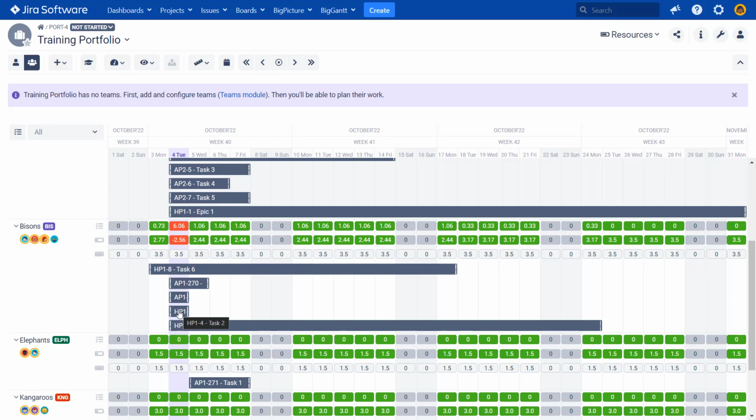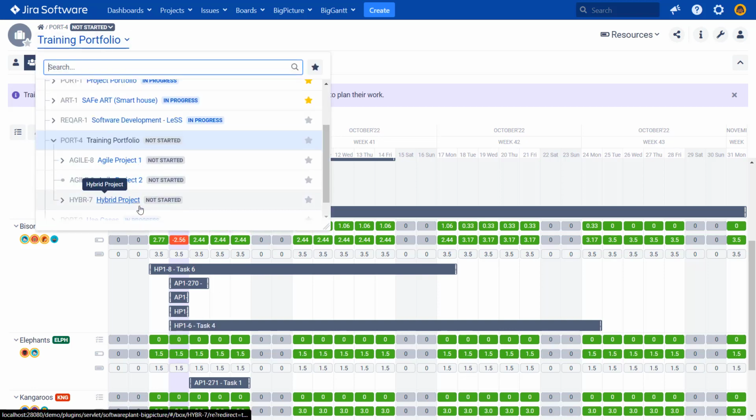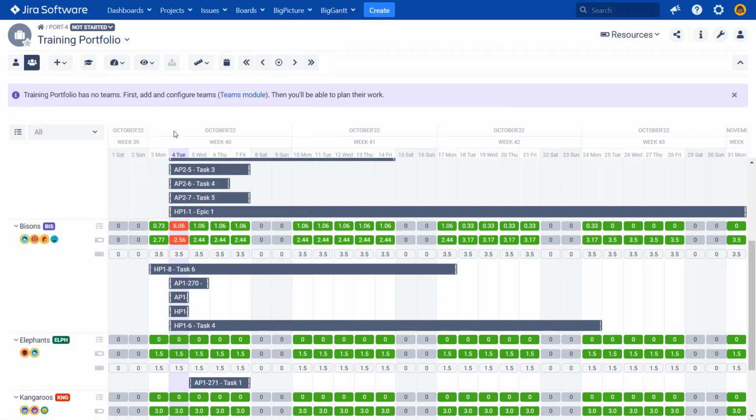So in that kind of setup where you have global teams, it is important to do the planning on the project level, obviously, but also switch to portfolio and see if from all the projects the team is not over allocated from the tasks from all the projects, because we may be working on our project, everything may seem fine, and then it will turn out that everyone thought the same and everyone from all the projects assigned 100% of team capacity to this team. So we need to switch to a higher level to see the overall allocation.